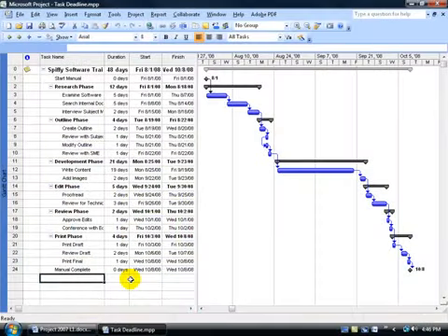In the previous training video on task constraints, we talked about how you can apply a constraint to a task start or finish date, like start no earlier than September the 1st, finish no later than September the 15th. When you do that, you limit the flexibility of your project. But again, we already discussed that. If you still want something to indicate when you're supposed to finish a task by, just a little icon, but that won't affect your scheduling, you can use what are called task deadlines.